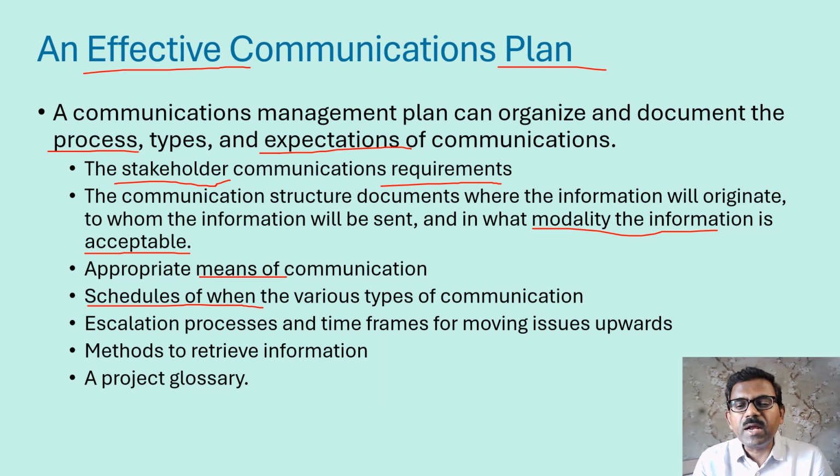Then the schedule, and when the various types of communication happen. Especially, the communication plan involves the different stages of the project schedule or project plan. So the communication plan is incorporated mostly in the project plan stage itself, so that you can align the reviews and milestones and schedule time and even costs. All those components we have to align in the communication plan so that it will be most effective.